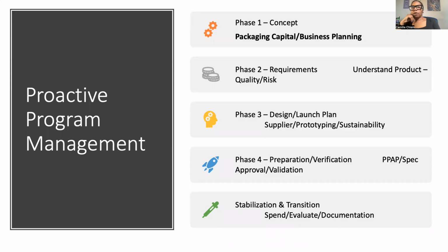And again, you can also figure out which parts are going to be a risk for packaging that you need to package for. You want to get to the point where you have so much information on previous programs and what's coming down the line for new parts that you're managing by exception. So you're really looking at developing innovative new packs for new parts, or parts that have been known over time to be difficult to pack, and they require a lot of protection. So you can focus your time on those versus looking at everything. You can start to narrow down.